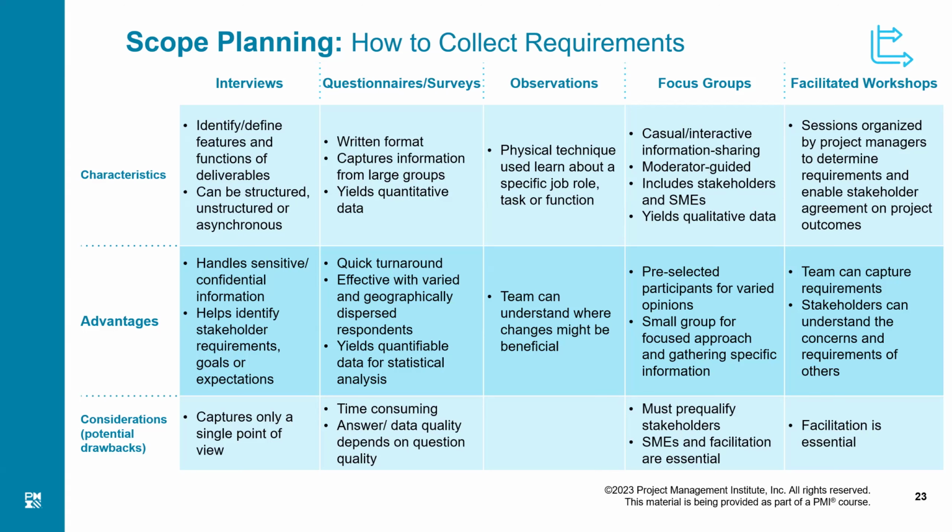Just like an interview, this is qualitative data. It is the quality of discussion which yields a lot of things. But this is better than an interview because it is not addressing only a single point of view, but we are having multiple experts' points of view. This is good, and the advantages are pre-selected participants for varied opinion, a very select, small group for a focused approach and gathering specific information.